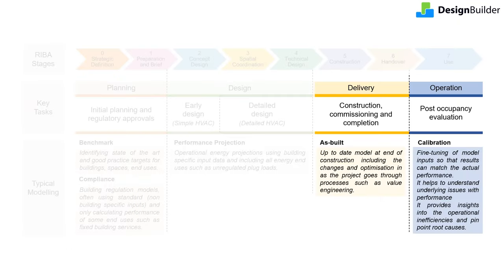During the construction stages, it is recommended that the simulation model is kept live and updated as changes and decisions such as value engineering happen. It should at least be updated at practical completion based on as-constructed commissioning information, so that upon handover the model aligns fully with the actual building. This model can then be used to fine-tune the building during initial years of occupation and indicate remedial actions.